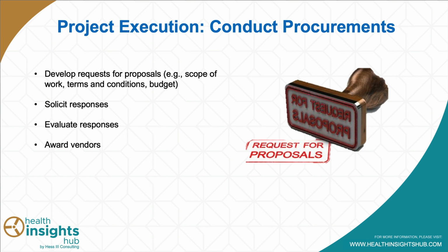Once you get them in, you need to identify, or you're going to pull in the folks that you previously identified to evaluate them, give them the audit checklist and the tools, the evaluation criteria to review each of those responses, and then you're going to actually award those vendors. So again, conducting procurements can be real fast, or it might be something that is a whole side project or sub-project that you want to track over time and make sure that it is keeping your overall project on schedule.